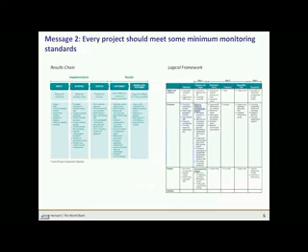So monitoring is the basis for all other types of work, and that involves the common tools that you most likely know: developing results chains where you lay out your theory of change, putting this together for your desired objectives across the different activities, outputs and outcomes, defining indicators, defining what data collection method you want, whether a questionnaire or focus group, etc., and defining who is responsible for it.